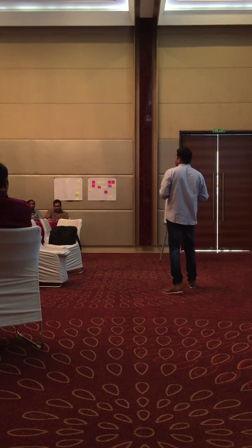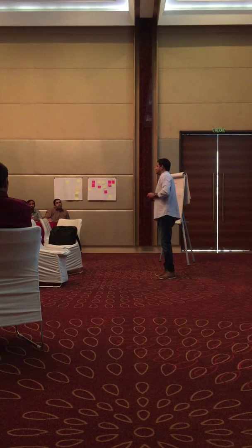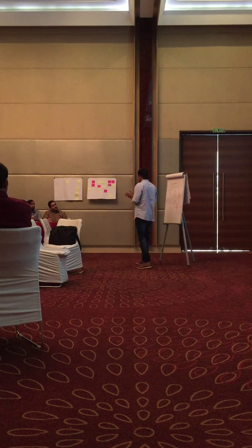Agile processes harness change for the customer's competitive advantage. Again, it needs collaboration. How important is it to change the order or something, right? Generally, we don't allow new things to come in. Sprint backlog contains the items that the team is picking up to complete as working software in the particular sprint. It can be defects, it can be user stories, it can be some enhancements related to technical architecture, anything.